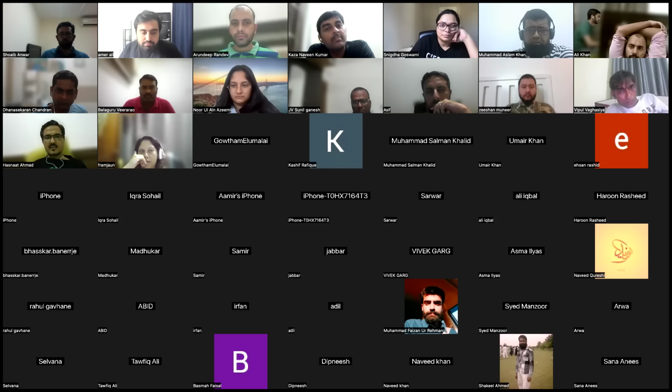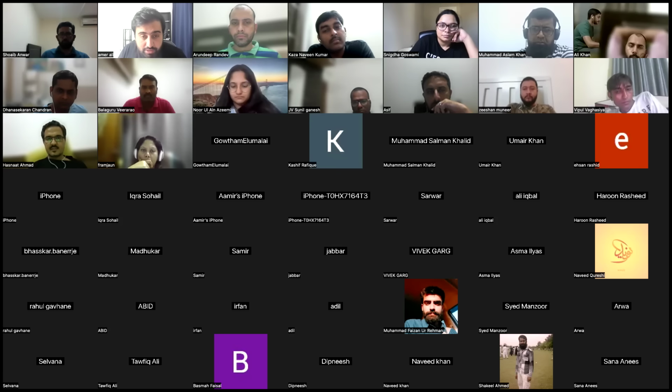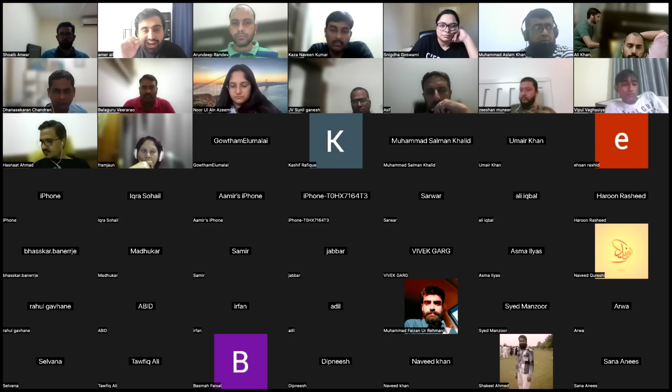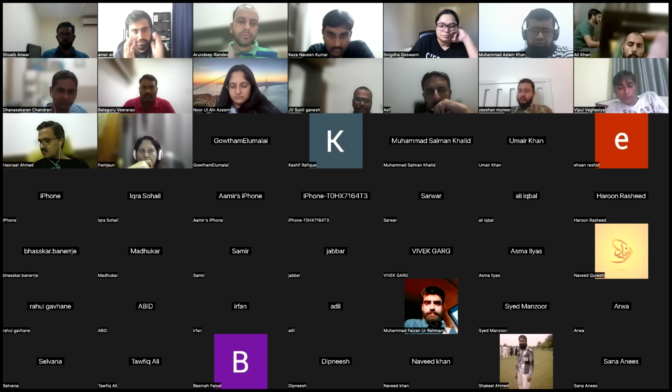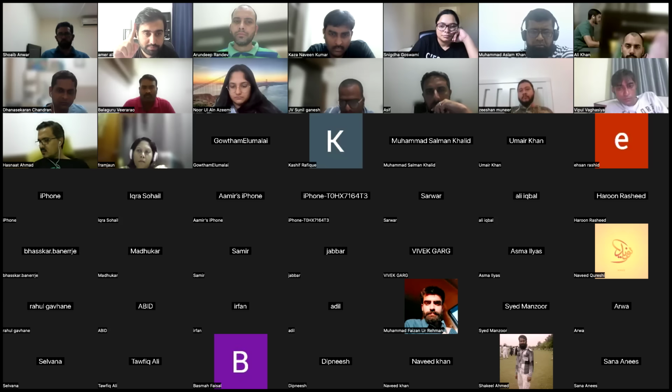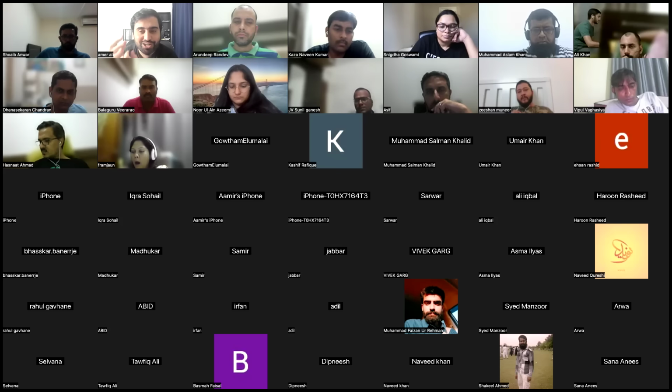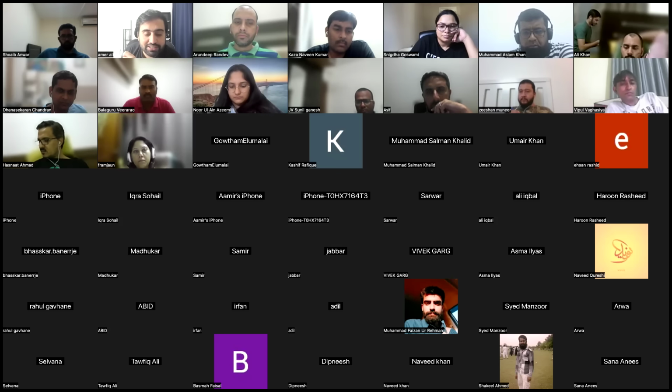Okay, now I have collected the user stories. I have prioritized the user stories. Now what I will do is put them all in the product backlog. From the product backlog, depending upon the estimated velocity, that is how many story points we can do in one sprint, let's say a sprint is 2 weeks, how much work can we do in one sprint? In one sprint, we put it in the sprint backlog.